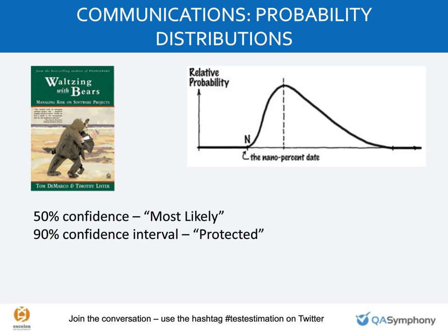But what I'm trying to get at is we can say, wait a minute, you want an estimate. Do you want our most likely chance of making it? Or do you want our commitment to deliver? Do you want 50% confidence, most likely? Or do you want, based on past experiences, expecting things to go wrong, adding a little bit for risk? We can commit to 2 weeks based on what we know, right? There's a huge difference between that.